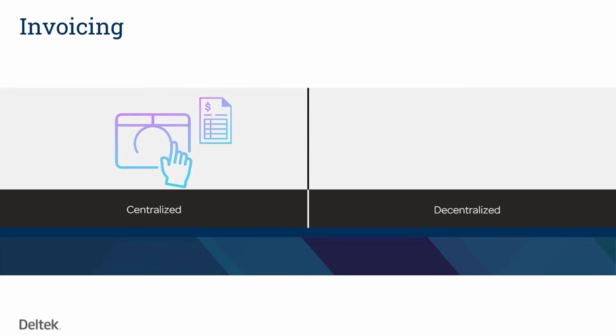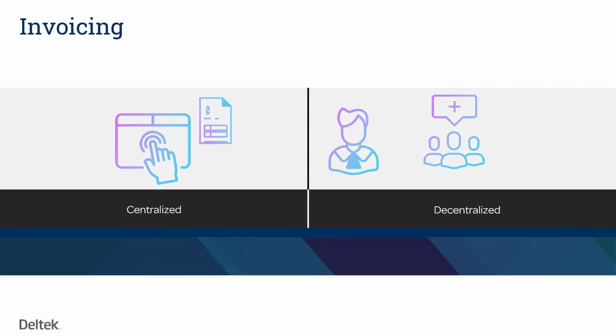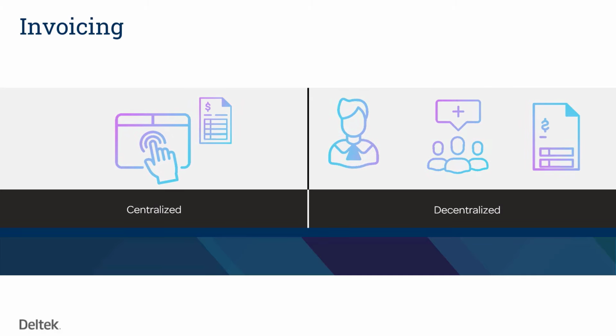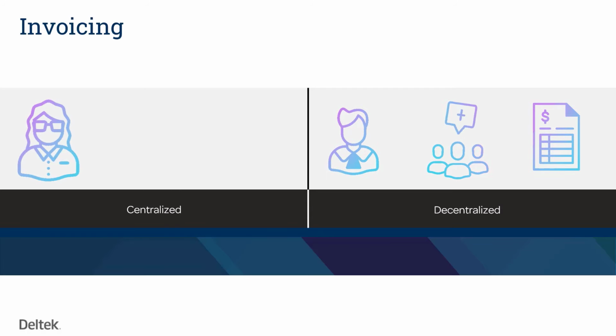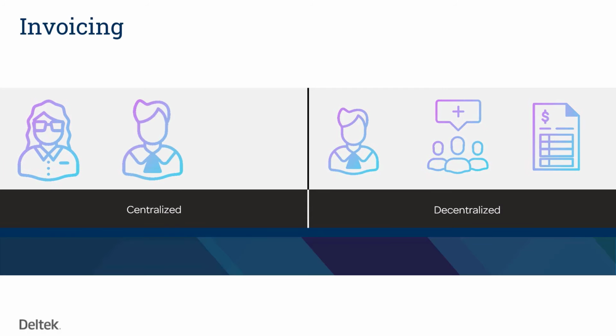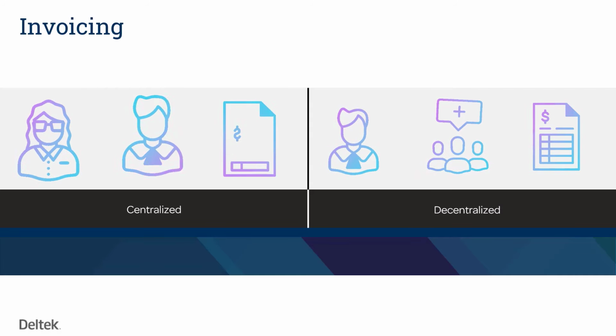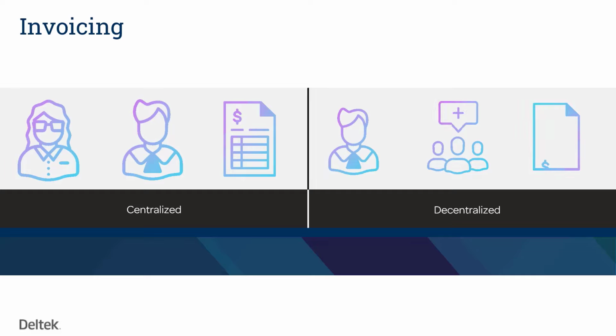Now, who is responsible for executing these invoices? Meconomy Power Launch supports both a centralized and a decentralized approach. You can have project managers review, edit, and approve drafts from a decentralized point of view, and have it sent to finance or AR to have them do the final printout. Or it can be the other way around. Have finance prepare the drafts for review by the project manager. Once approved, they are sent back for final printout. Now let's log into Meconomy to see how it works.